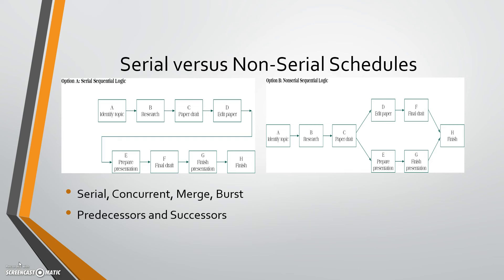Just the opposite is a burst activity. Also on the right you can see C, the paper draft, and that's bursting into both D and E, which can be done at the same time or in parallel. Think of it this way — merge is you're bringing together, burst you're exploding out. And then there are predecessors and successors.